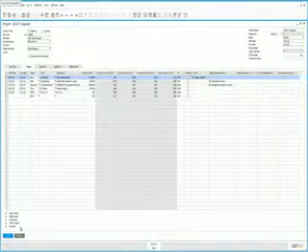For this particular project, we have a scoping task. We then move on to budgeting, which actually happens in parallel with the scoping phase. We then move on into the implementation phase, and then we have a finalize as well as the go live phase. Let's highlight the scoping phase. If we scroll down to the bottom here, we've got a number of options to review. We've got open issues, any attachments, any documents, work orders, or activities.